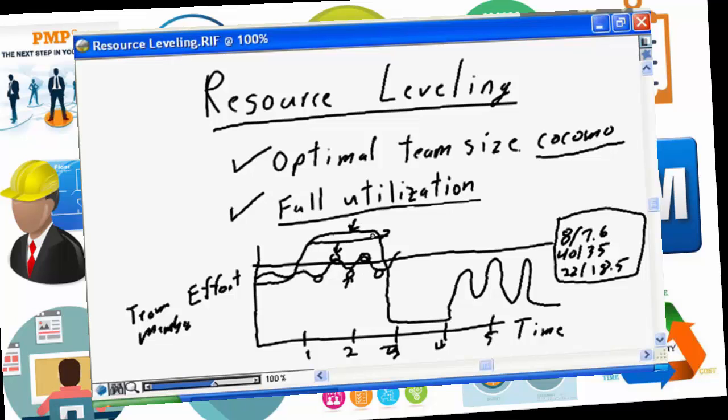This does mean overtime. You should not be building overtime into your project plan. And this means unavailable time. The team member is sitting at their desk, twiddling their thumbs, waiting for work to arrive, waiting for a predecessor task to complete so that they can start their next task. Unproductive use of time is going to consume project budget, and can be demoralizing and very disruptive to overall team spirit. If they see a team member sitting there playing solitaire on their PC, twiddling their thumbs, talking on their phone, interacting with other team members who are busy, this can be very demoralizing and not effective team utilization.